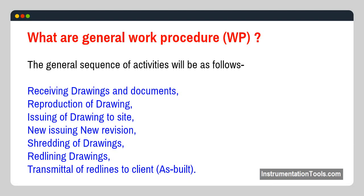What are general work procedures (WP)? The general sequence of activities is as follows: receiving drawings and documents, reproduction of drawing, issuing of drawing to site, issuing new revision, shredding of drawings, redlining drawings, transmittal of red lines to client, and as-built.